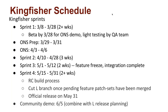The Kingfisher schedule will consist of four sprints spanning about three months. The first sprint will start this Thursday, going for two-plus weeks. We're trying to wrap this up a few days before ONS to ensure we get a beta. There will be some light testing from the QA team so we have a somewhat stable release for the demo. Folks are welcome to use whatever they have on master. For ONS prep, we'll take three days, spanning from March 29th to 31st, to make sure demos are ready.